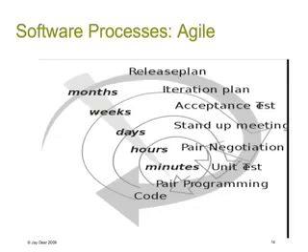Next example of a software process is the agile process. Key point for me here is the time scale shown on the diagram. That you may have maybe months between different software releases, but then you're down to days between how you're structuring your activities, down to hours for negotiating, and down to minutes between the difference between programming and test. Typically, programmer sits down with user, does some programming, says, is this what you want? And no, I'd like that button over there, can it do this? What happens when? So very rapid test iteration cycle.